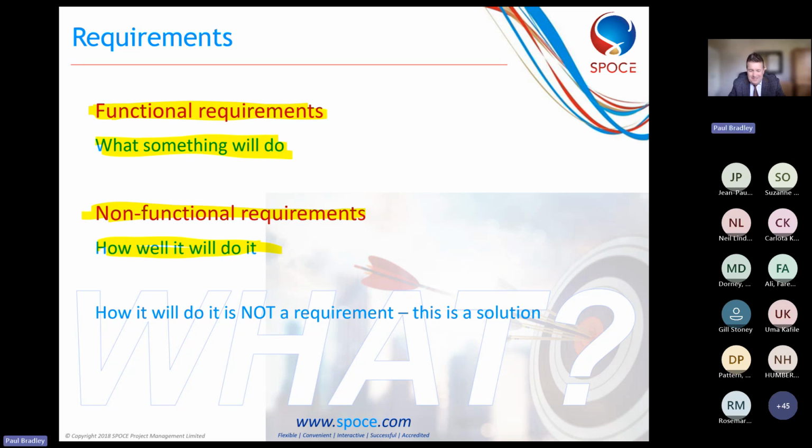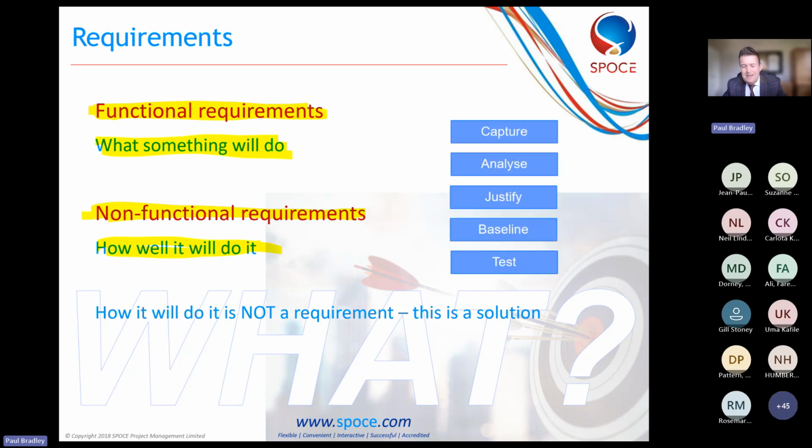Right, so once we've understood the requirements, and also leading up to all of this requirements gathering, we need to think about how we capture and analyze those requirements. Now, there's a typical 5-step approach for requirements management, and the first step being capture. We capture the requirements, usually looking to call them from the stakeholders themselves. Okay, so if you're ever wondering where these requirements come from, talk to your customers. That's where they're coming from. Talk to the users. Capture those requirements, and then we can analyze them.